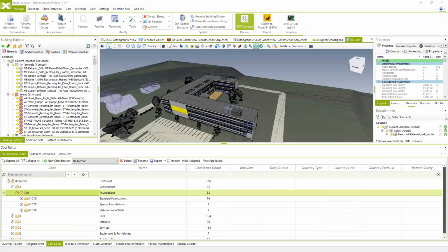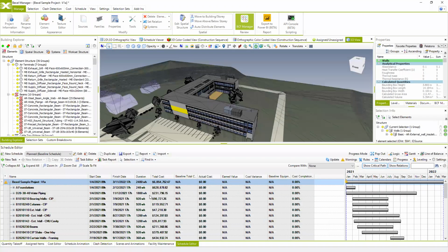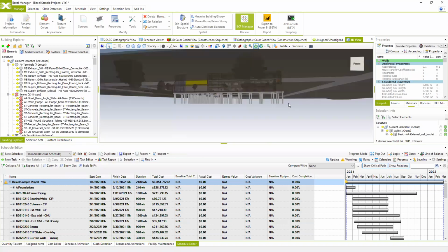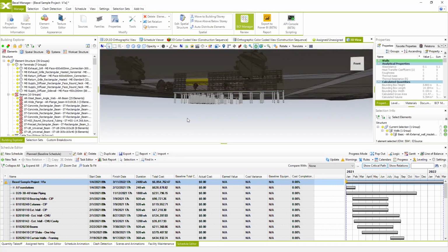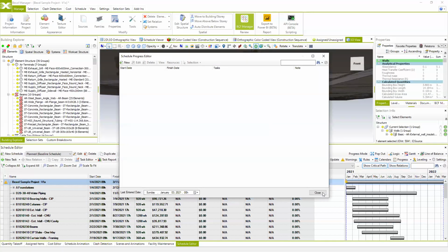How do you manage change to the total cost value and changes in the model schedule? So the total cost value is actually automatically generated based on the progress. Once I input the progress from selected elements and input the real resources which are actually used on site, this is something that I presented in the first example.